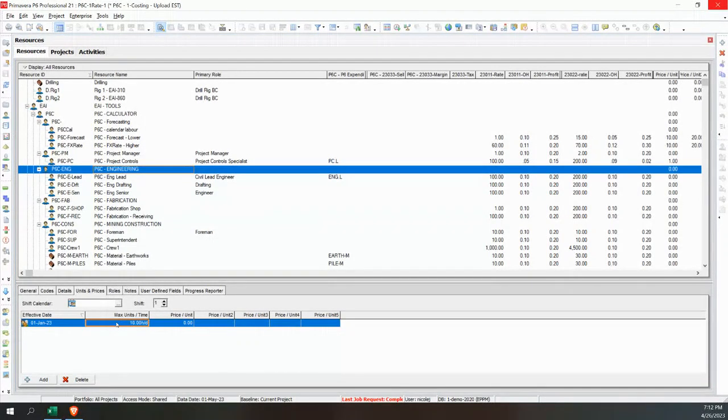contractor clients, what we did was we said, okay, well, instead of using these 5 out-of-the-box rates, we're going to let you put in rates for every single project. That way we've got a consistent dictionary, and that dictionary will allow us to compare all the projects and see which ones are actually hitting the cost that we put in and which ones are blowing that cost out of the water. Okay, or which ones are doing better. So that's an important piece of the puzzle.